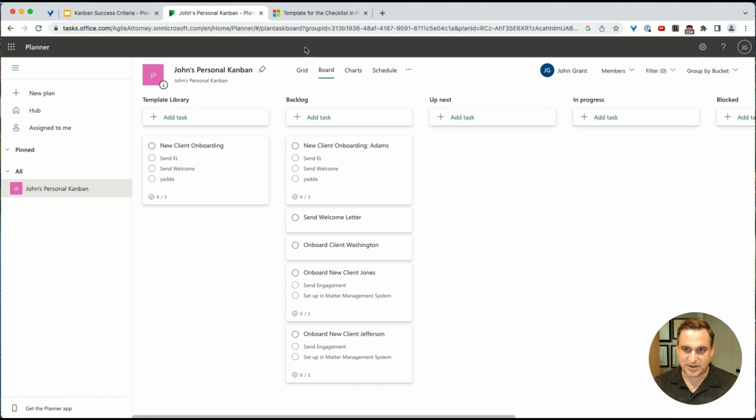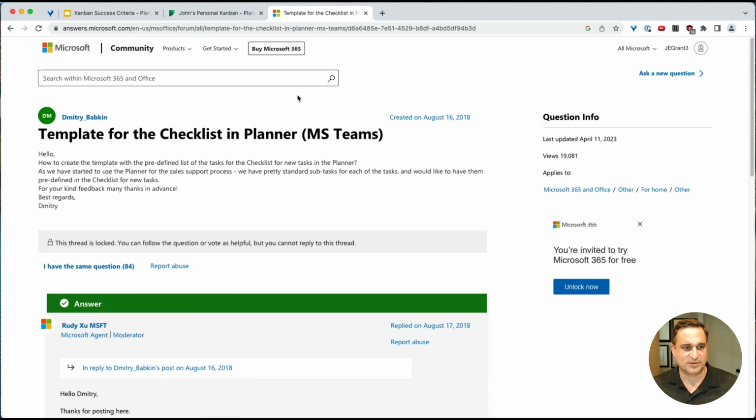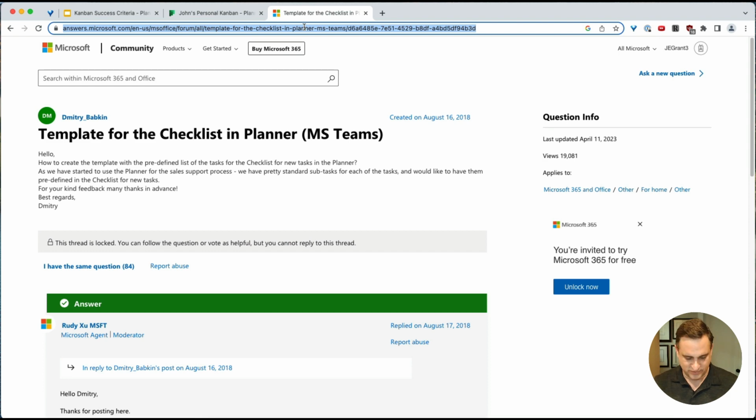Again, what Microsoft is calling a bucket at the same time. And that's really a protection mechanism to make sure that you don't throw too much work in progress. You're not juggling too many balls at one time, so that you're only doing these light touches on them and none of them are actually making progress. So the place where I always start in terms of WIP limits is an in progress column. I'm looking here, I can rename it, I can move it. It doesn't look to me like there's an opportunity to do WIP limits, and I can just try a quick search, let's see what comes up.